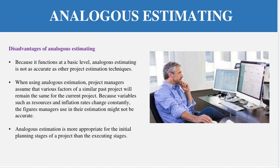The disadvantages of analogous estimation are: first, it is not as accurate as other project estimation techniques because it is done at a very high level without drill-down detail. Second, when using analogous estimation, the project manager assumes that various factors of similar past projects will remain the same for the current project. But variables such as resources and inflation rates change constantly, so the figures used in estimation might not be accurate. Every project is unique and temporary, so you can't say a previous five-month project means this one will also take five months.